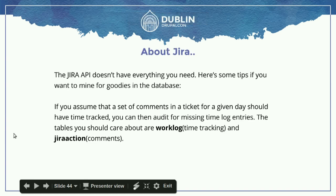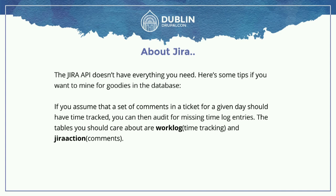Let's talk a little bit about Jira. I use and abuse the Jira API and do all kinds of crazy stuff — talk to me after if you're interested. It doesn't have everything you need. So if you want to mine for some interesting goodies in the database, there's some stuff you should know. If you wanted to do matching of comments in an issue with time tracking, you need to look at two tables: the worklog table (that's the time tracking table) and the jiraaction table (where comments are stored). If you can match worklog entries to the issue for a given day but there are comments in jiraaction with no items in the worklog, you know they need to track time.